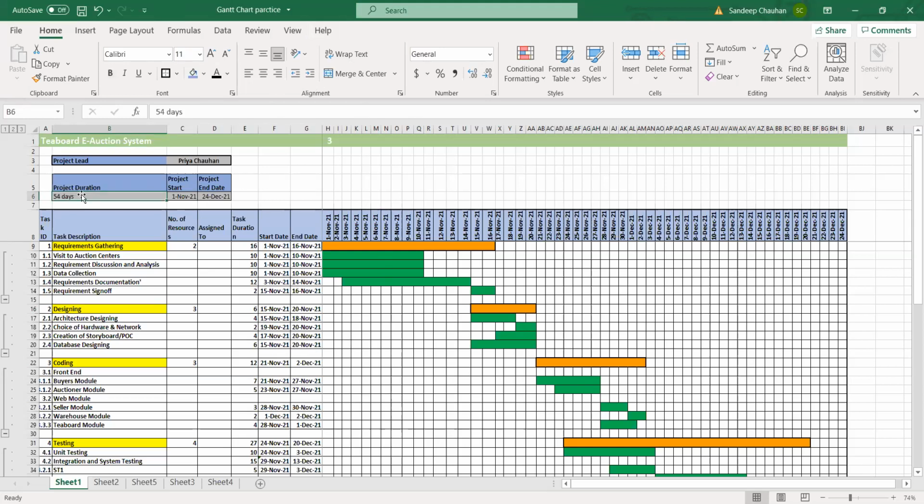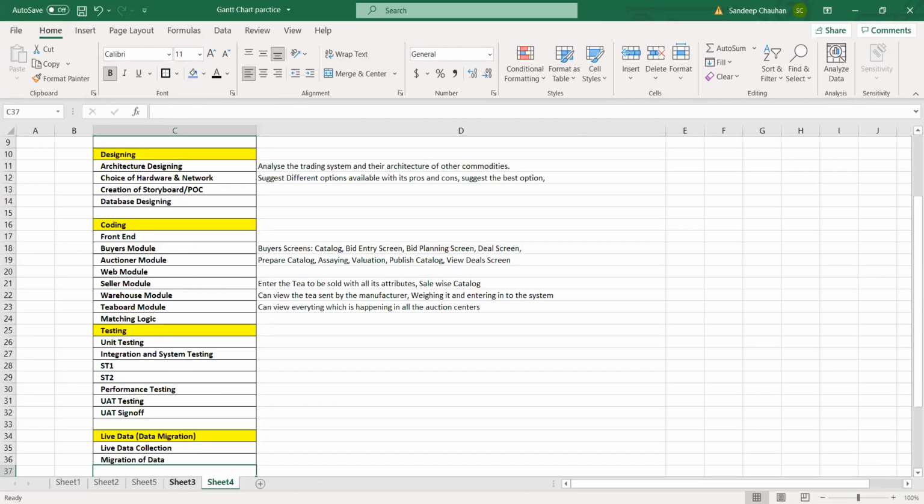I have a question. So the project duration will be the start and the end date, right? So the days in between, right? So you can create another level task before the first one and say the project name. So enhancement of attendance management system will be my super task, and then it comprises the total tasks which I have included in that. And which normally includes the warranty and support as well, which might go for, let's say, at least 3 months or so after the go live as well. So all those will be encompassed in my project.